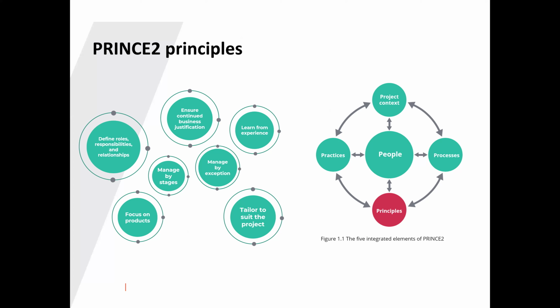So I can say that by the time we finish our project plan, and we want to baseline it to say, yes, this is now what we will be benchmarking our successes against, our work against. At that point, we can say, let's put a stage there. We run that plan through every key stakeholder on the project. And if all the key stakeholders are happy with the plan, we can say, yes, let us go ahead to now execute the plan. That is what we're saying we're managing by stages.